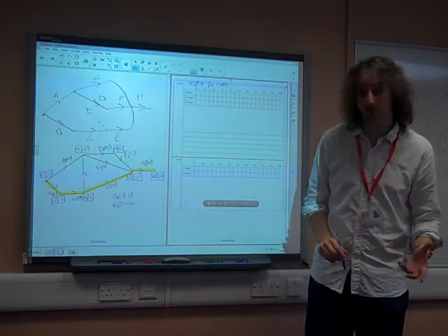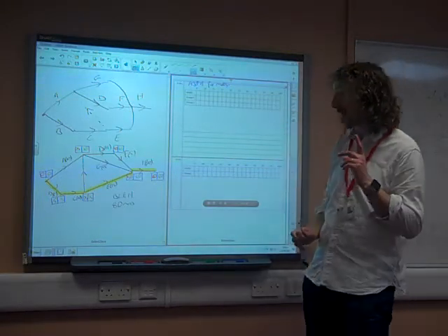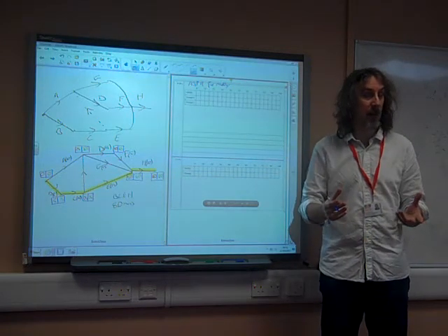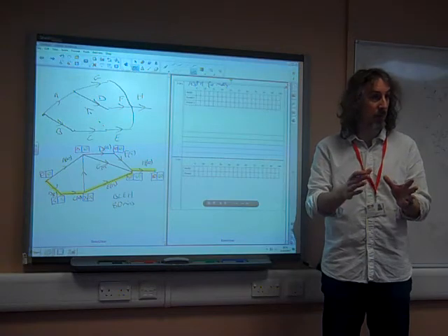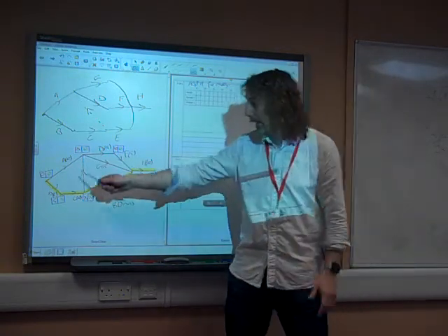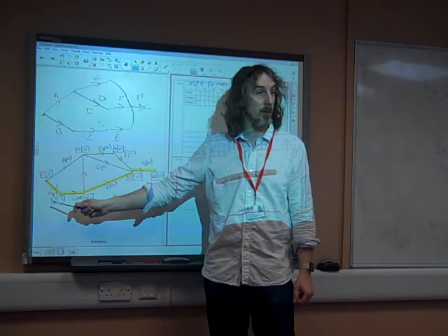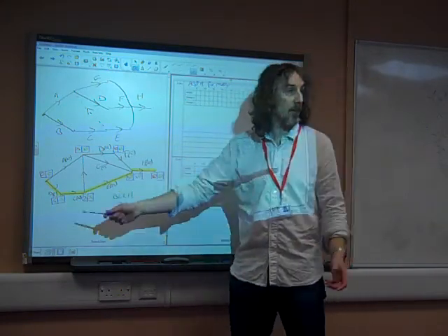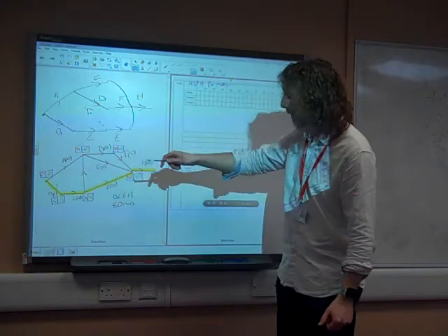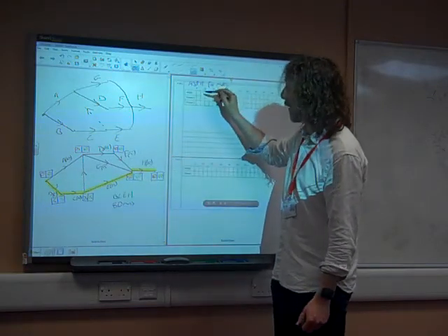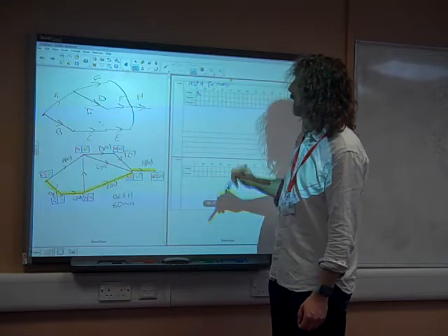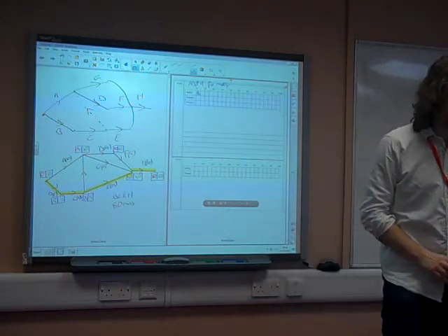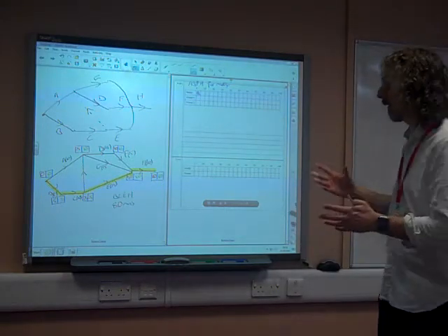So let's schedule some of these things. If this activity is going to complete on time, then the critical activities have to happen in the right places. We've got no flexibility. So B has to be the first thing that happens. It has to be, because it's critical. So if she has to do B, and it has to be first, we have to put B in that box, because that takes the first 5 minutes of what happens. So if you didn't put B in the first box, instantly things have gone wrong for you.